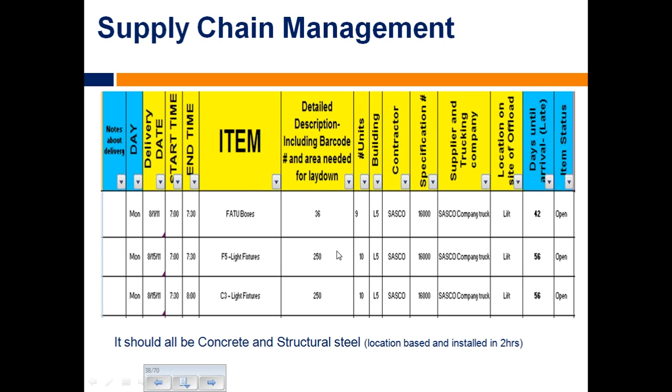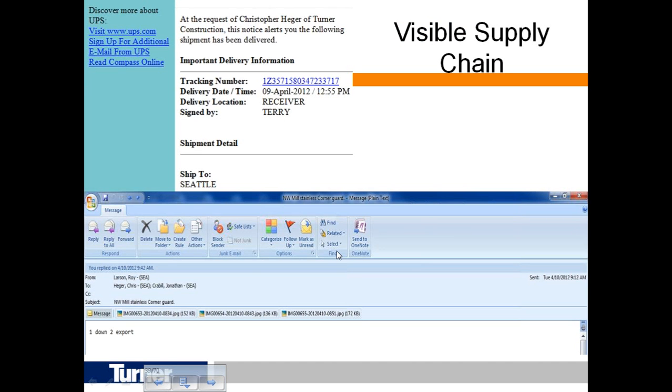With these discrete pieces, again, we talked about an assembly line. We assemble the supply chain. The data out of submittals gets loaded directly into a supply chain management piece. That visible supply chain gets tracked as units and pieces come from fabrication across the country.